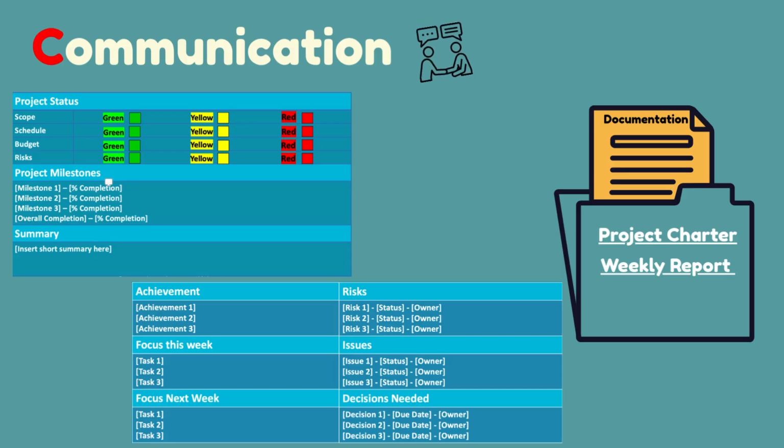So, here you go. In a weekly report, we recommend you start by providing the project status in traffic light mode. Green means good, healthy, or without issue. Yellow means so far so good, not very good or not very bad. Red means something went wrong and needs attention.